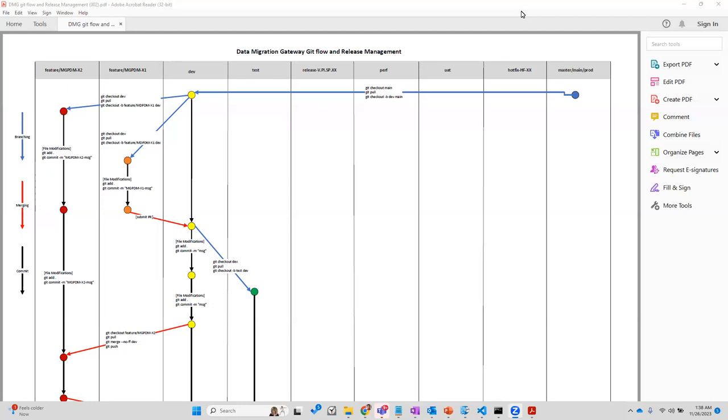Does anybody know about the waterfall model of project management? You must have studied waterfall in engineering, right? In waterfall, you first define a requirement, then the requirement phase runs 3-4 months, then you go for development, then deployment, then testing, right? Then it goes live. If any issue comes up, the requirements change again and then it all goes again. Agile is not like that. Agile is continuous development. Whenever anything changes, you just add a story and keep working on that. It's work in small increments, right? It's a project management methodology.